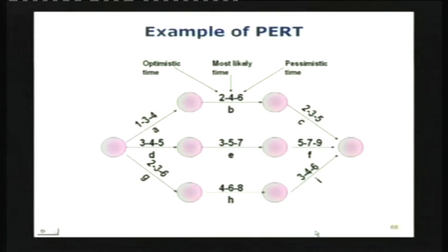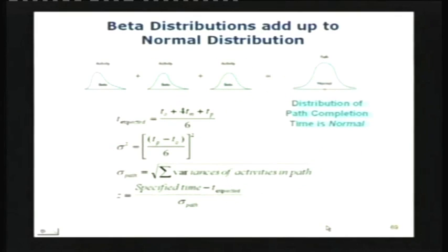The first thing I have to do is convert these times, which have been given as 3-point estimates, or triangular estimates, to random variables. If you look at any one of those tasks, the time will have a distribution. So I have that for activity A, the same thing for activity B, and the same thing for activity C. That path A, B, C would end up finding a distribution of its own. The sum will have its own distribution that's composed from the individual random components.